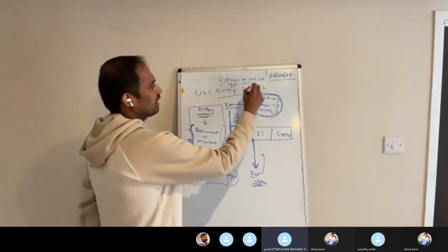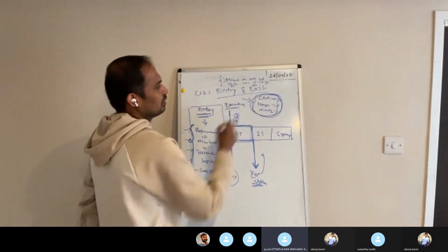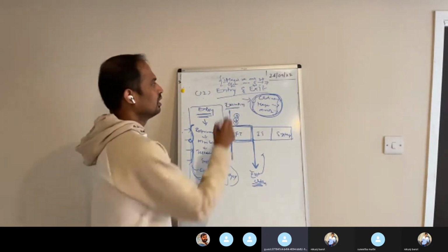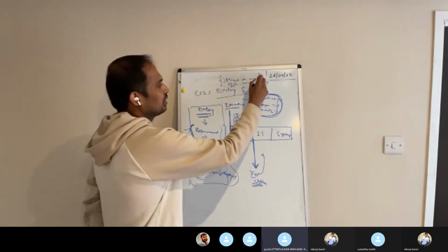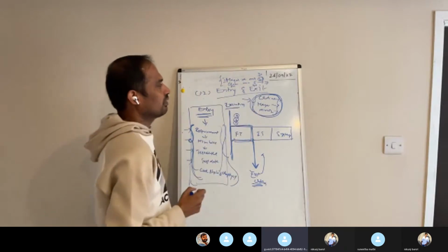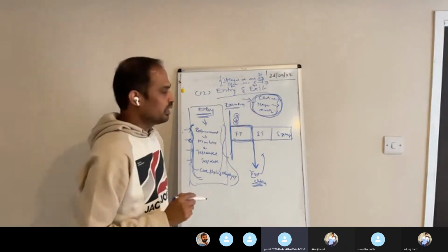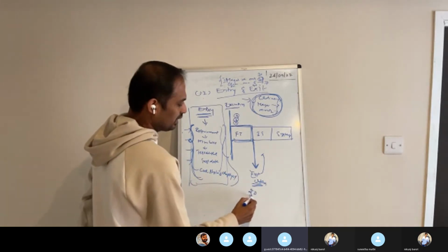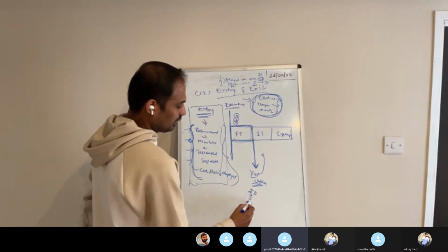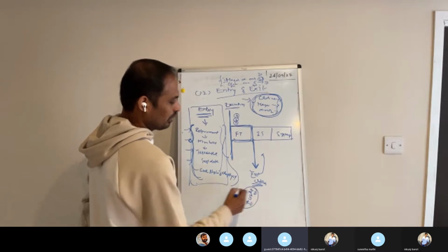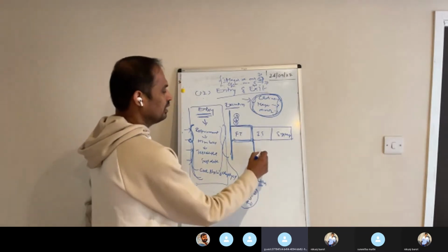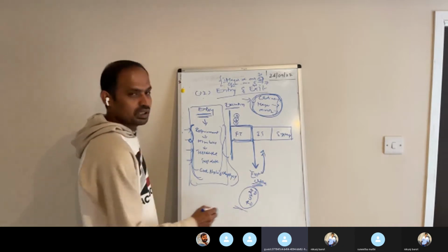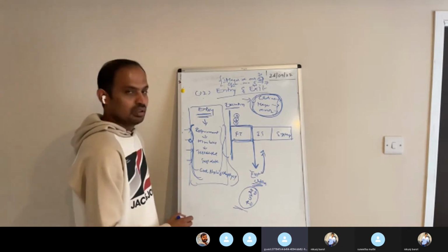If we have 7 critical defects, then we can't go to integration testing. If you have 30 major defects, because our exit criteria is 20, it should have only 20 major defects, 5 critical defects, and 40 minor defects. If you don't meet this requirement, then we can't go for integration testing. So we will mention that here in the exit criteria.